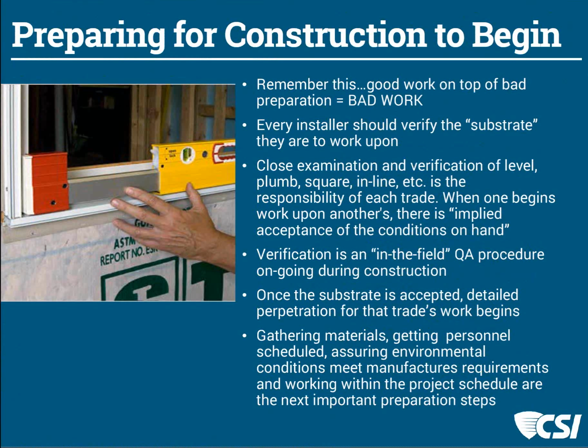Well, that's an implication. I've worked on jobs where contractors have forms that specifically say that. A contractor has inspected the substrate, accepts it in its current condition, and agrees that it will allow them to do their further work in accordance with the contract documents. Again, means and methods as a general contractor, but those are the kind of things that you like to see, because they give you an understanding that this contractor really is actively involved in the means and methods and in the management of the quality of the work that they're going to do.